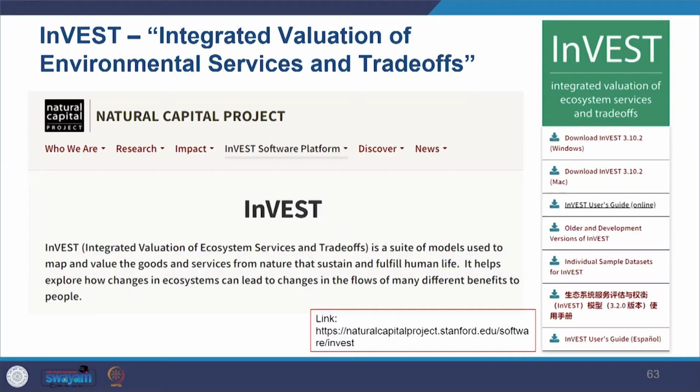And in order to find out the scope of avoidance, like where all you can avoid, you may model the alternative scenarios. So you can do modeling. You can develop scenarios by using tools such as InVEST, which is Integrated Valuation of Ecosystem Services and Trade-offs. These tools largely focus on mapping ecosystems and estimating ecosystem service supply. They have also been making considerable advances in mapping demand.